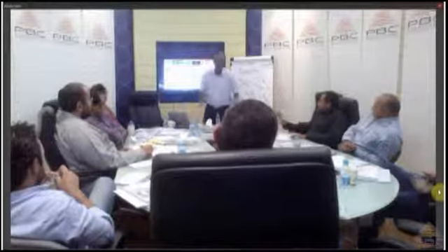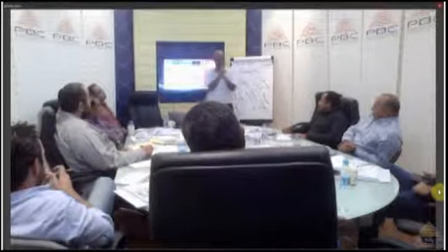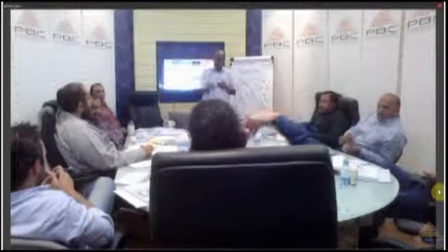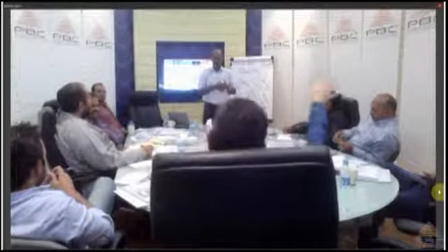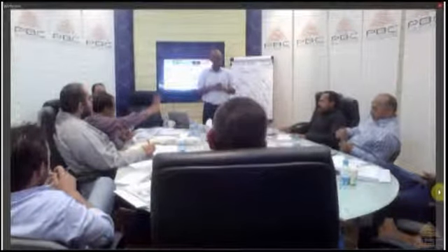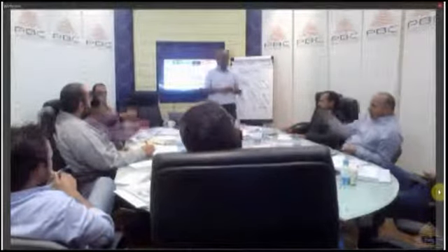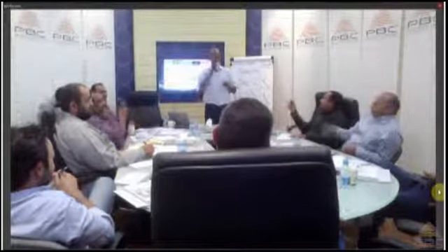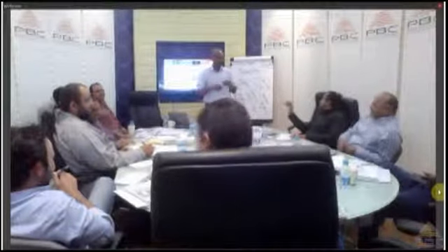Okay, so how can we minimize these surprises? As usual, we make samples. So you agree with us, and you should sign on that particular accepted one. Then we continue. Cheat sheet.